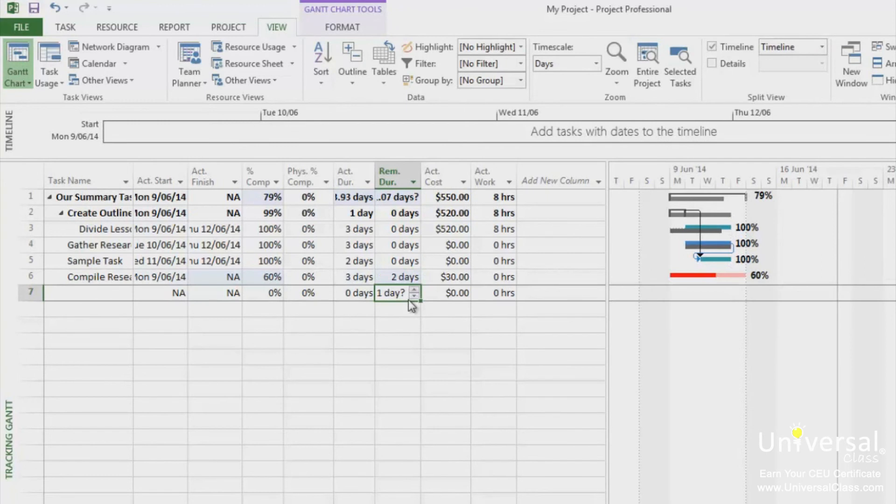Fixed costs aren't changed by time. In other words, they aren't hourly or daily charges. It's just a set fee. To track fixed costs, go to the Gantt Chart view.